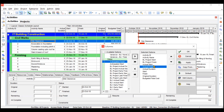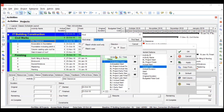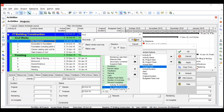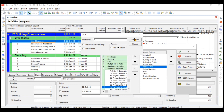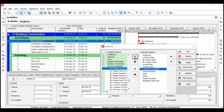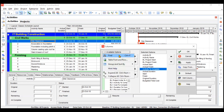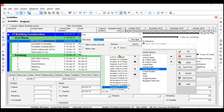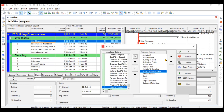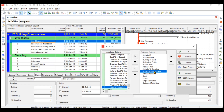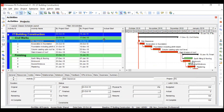Next you need to add two percentage complete columns — Activity Percentage Complete and Schedule Percentage Complete. Simply type 'percentage' in the search and go to Next. Activity Percentage Complete shows how much of the activity is actually completed, while Schedule Percentage Complete shows what the planned percentage completion should be till this particular date. Move both columns into position and click OK.